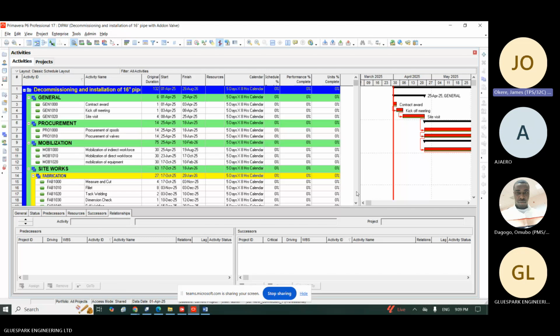With that, I can plan my resources. I can plan my duration. It means if I'm using one mason, if I have that task as an activity, I will put 67 days. You see how the planning of resources helps you get the accurate duration for your activity. I don't know if I'm making sense. So if I'm making sense, please let me know if you are understanding what I'm saying before we enter into the practical.